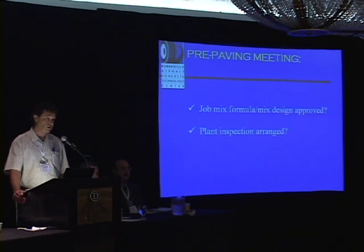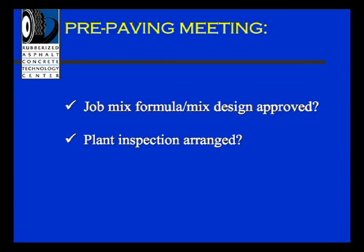What continues to surprise me is the number of cities and counties who do not arrange for plan inspection through a qualified consultant or through their own lab, in particular on non-federally funded projects. One of my most common calls at the RACTEC has been, we had a project go bad. First question I ask is, did you have plan inspection? Well, no, but next time we will. Well, next time is too late.